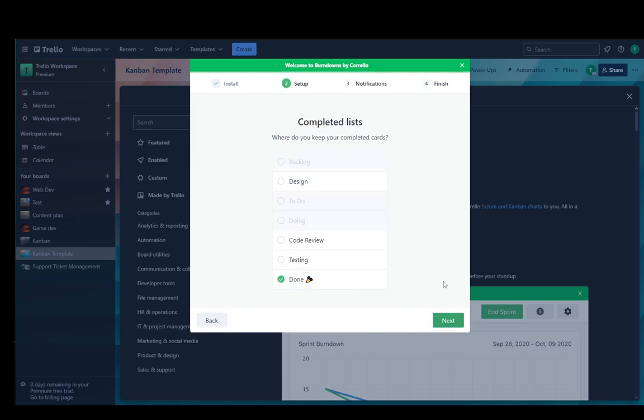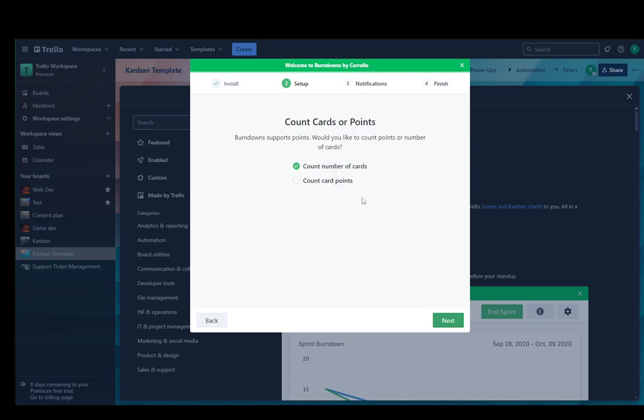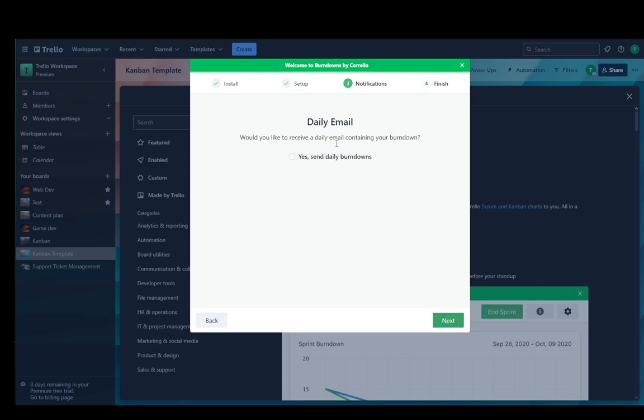Now I'll select count by number of cards. You can also count card points. I'll just select number of cards, it doesn't really matter. And then you can select to receive daily email burndowns if you want to, as well as Slack updates, which I won't be doing.